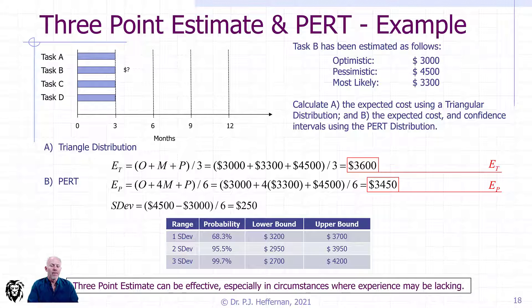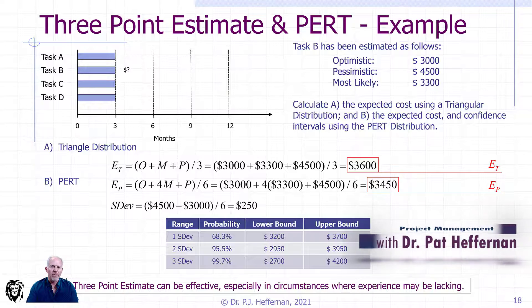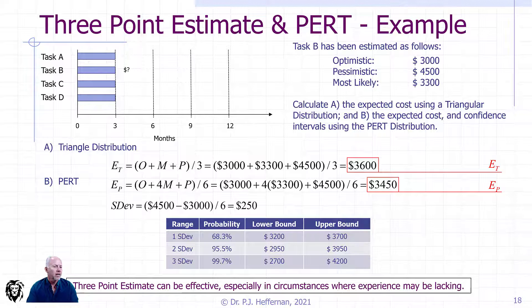Personally, I think the PERT approach to three-point estimates is something that I would almost always do for most estimates that aren't like a contract estimate where you actually have a submission by a company that wants to do the work. If there's at all any variation, I think the three-point estimate is so easy to program into your spreadsheet, so easy to integrate into your processes, it's one that I think is well worth doing.